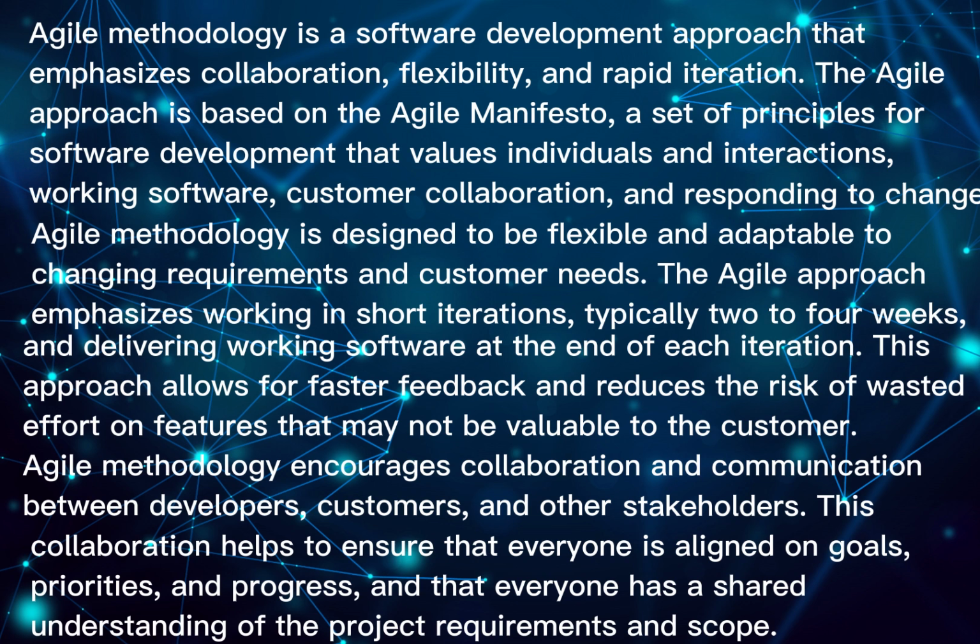The Agile approach emphasizes working in short iterations, typically 2 to 4 weeks, and delivering working software at the end of each iteration. This approach allows for faster feedback and reduces the risk of wasted effort on features that may not be valuable to the customer.